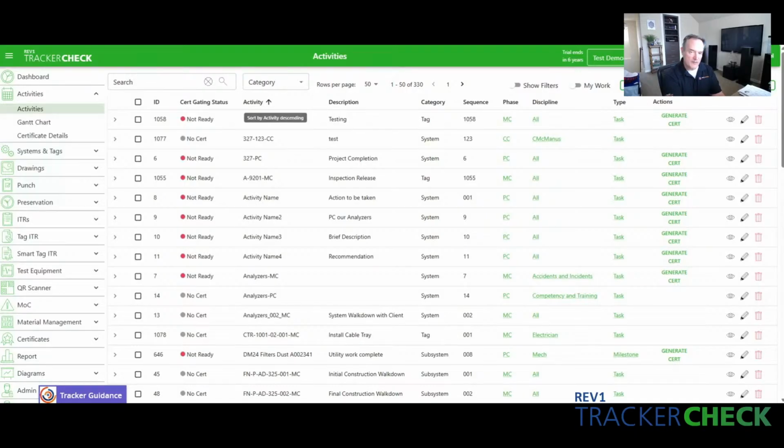We're not trying to replace it. We're trying to enhance it. So the scheduler, you deliver your schedule. You can take that entire schedule and, based off the activity, pull it into the system if that's what you need for the project, or you can just cherry pick the data that's appropriate for commissioning or startup or the mechanical completions and just bring those items in.